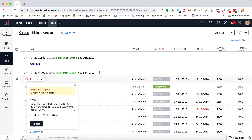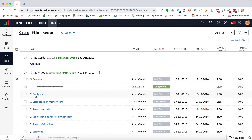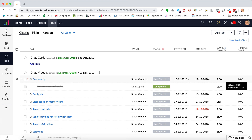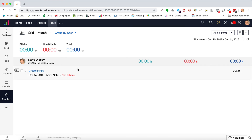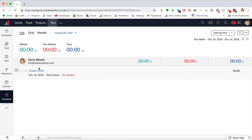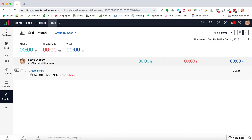I can click on the timesheets and see all the time spent on each activity, grouped by user, by month, and see all billable and non-billable hours. This gives me a much better understanding of how projects are progressing, who's spending time on what, and why things are or aren't getting done. For example, if creating a Facebook post took four hours, the timesheets might reveal you got distracted and spent three hours scrolling pictures of cats — it shows you where you're leaking time.